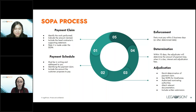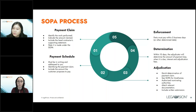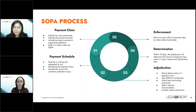The main requirements under the legislation are that the payment claim has to identify the construction work to which it relates. This is an important point because in many adjudication processes, respondents have successfully argued that a payment claim was invalid because it was too vague or not specific enough. So when putting together a payment claim, make sure it's very clear what exactly is included. There may be a general understanding between the parties, but it's always good to have it properly set out and explained in writing.